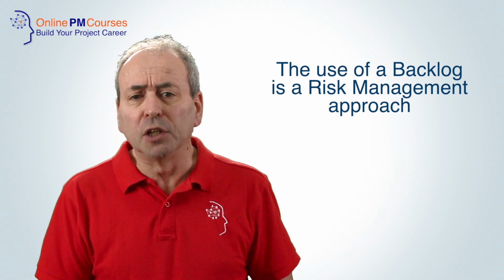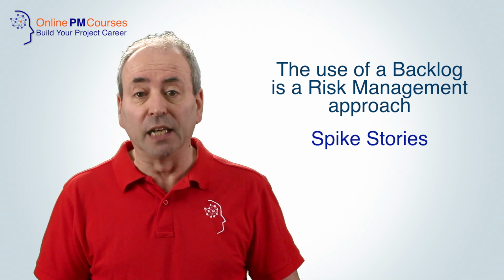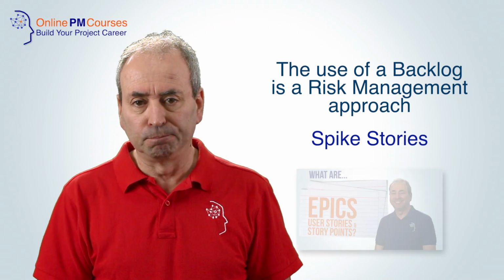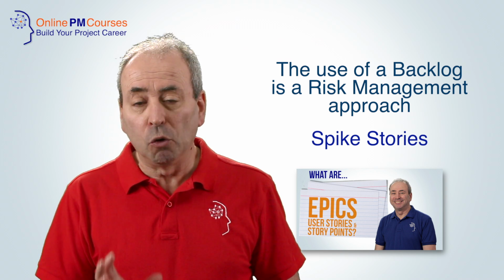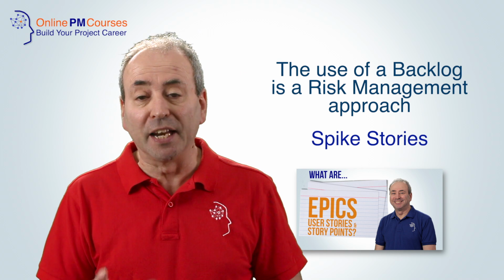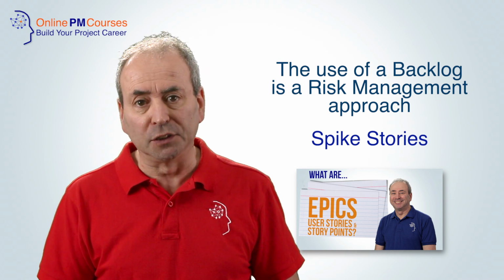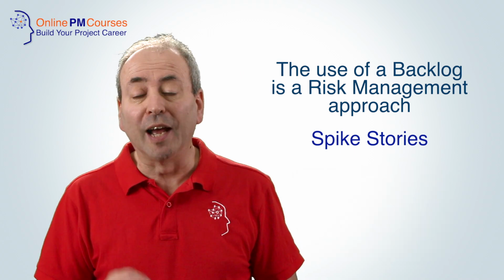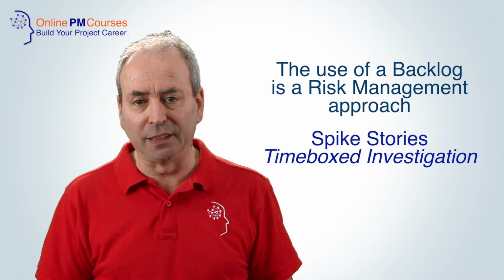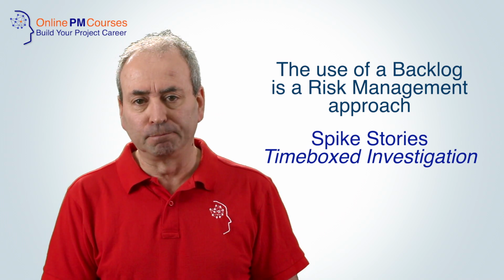Secondly, we can use spike stories as a means of investigating uncertainties. A spike story is like a user story, but it is a story designed to investigate and answer a specific question, and therefore reduce uncertainty and risk. A spike story is also known as a time-boxed investigation, which for me is a far better description.